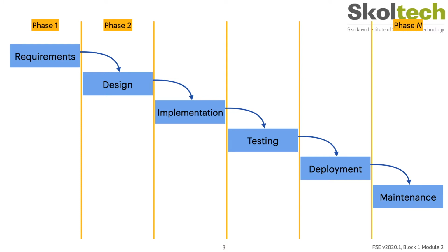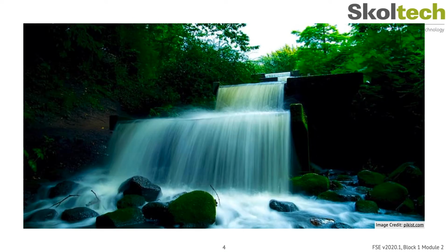Waterfall is the plain vanilla of the predictive model world. It assumes that you finish each step completely and thoroughly before you move on to the next step. To this end, you iterate requirements, and then design, implementation, testing, deployment, and maintenance, one strictly after another. Note the clean delineation of the phases in this process, and that's called waterfall because, well, you can imagine water cascading from one step to the other.